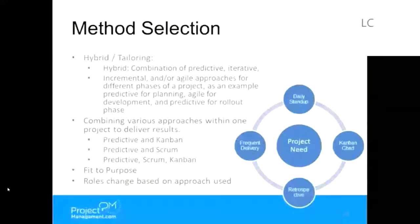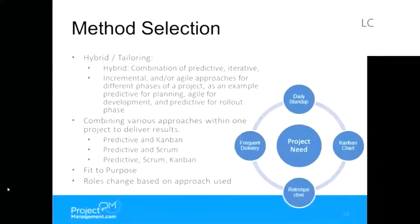And then your roles are going to change. One of the things that I talk to a lot of people about as they implement Agile, they're really implementing Scrum, is where does the project manager fit in here and where does the BA fit in here? And my answer does come back to tailoring. The Scrum methodology has three roles: the Scrum Master, the product owner, and team members. We can still have somebody specializing as a BA working with the product owner on developing good stories, on making sure "requirements" are presented in the user story manner.